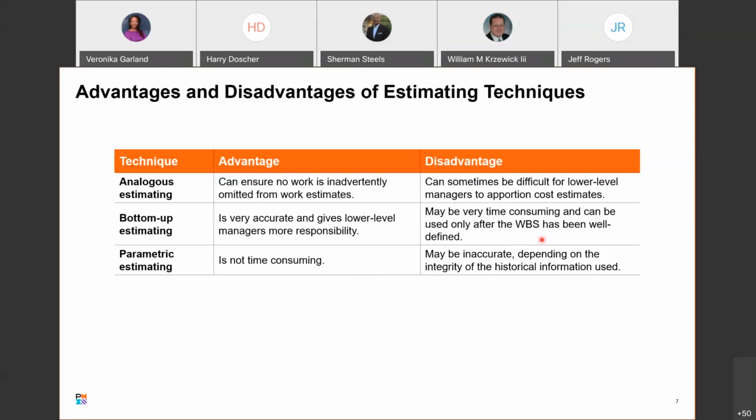Well, you establish the work breakdown structure, which details what has to be done. You then assign teams to that particular list of activities. So once you've done that, you can then get the bottom-up estimate from those teams. Okay. Thank you. Sure. And that's why they say that it can be very time consuming. Because at least at AT&T, we always have all the teams set to go from day one of the project being kicked off, right?